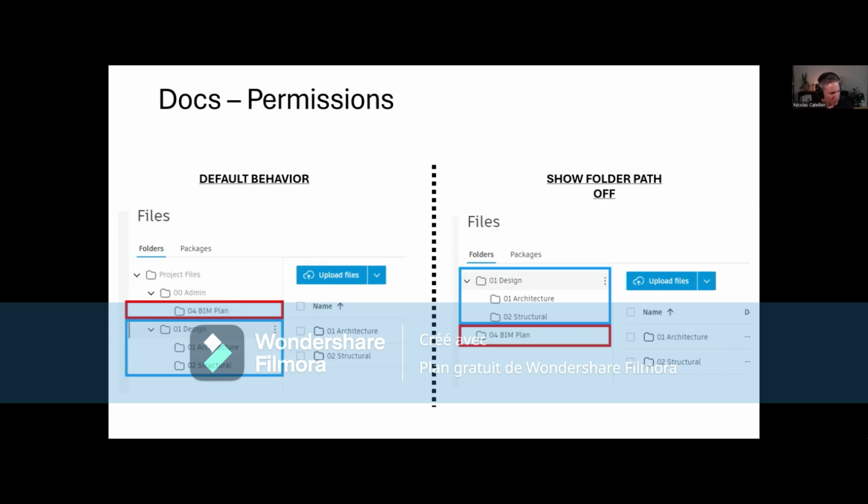Yeah. There's a question from John Segler. It seems like using roles for permission levels instead of company, you will give engineers permission to edit other disciplines' data. Yeah, that's a great talking point. Let me explain how we do it, and I will explain how I did it at my previous firm. Because we have engineering in-house, we just use the term engineer. We don't use mechanical engineer, structural engineer, plumbing engineer, electrical engineer. We don't subdivide engineering. You can totally set up your permissions so that when somebody's added to the project, you assign them the role that matches the folder they should be working in.